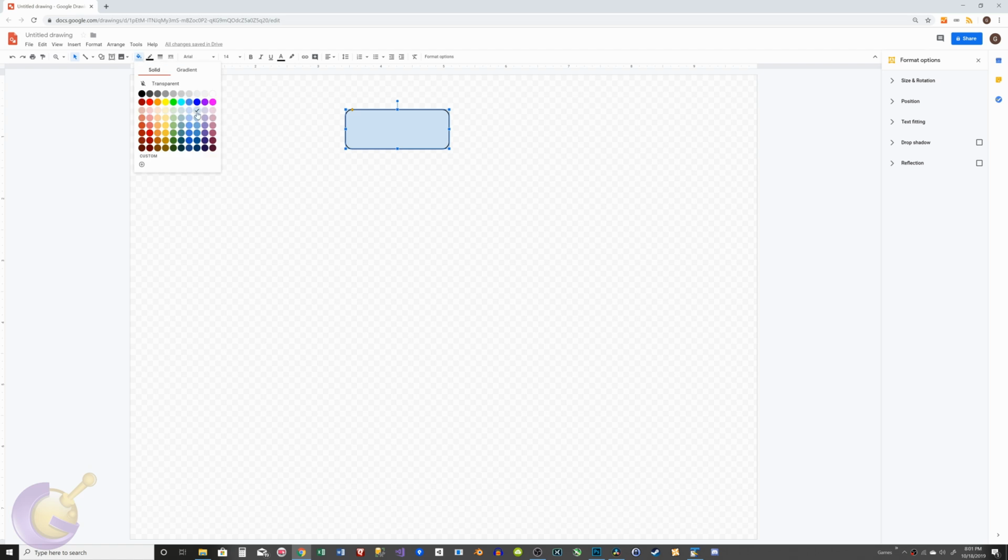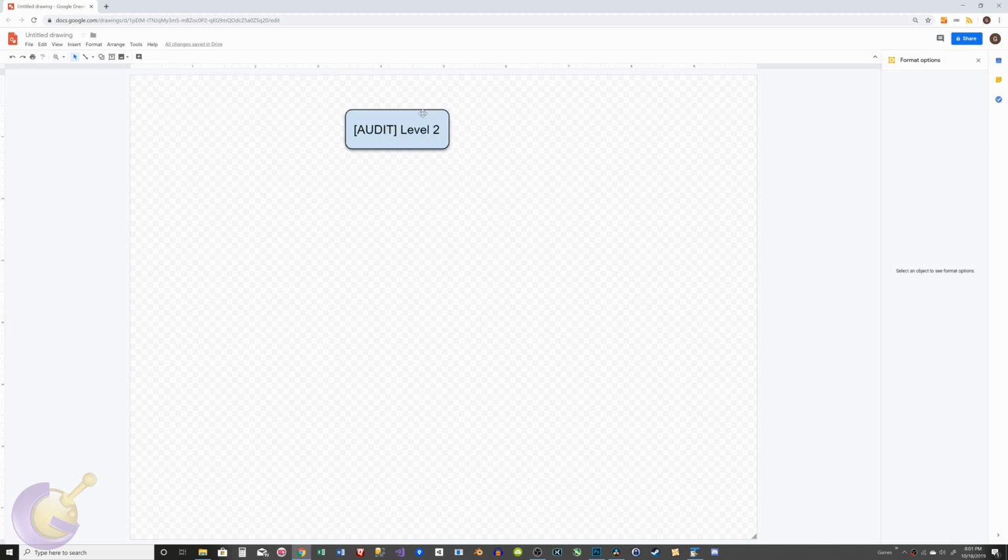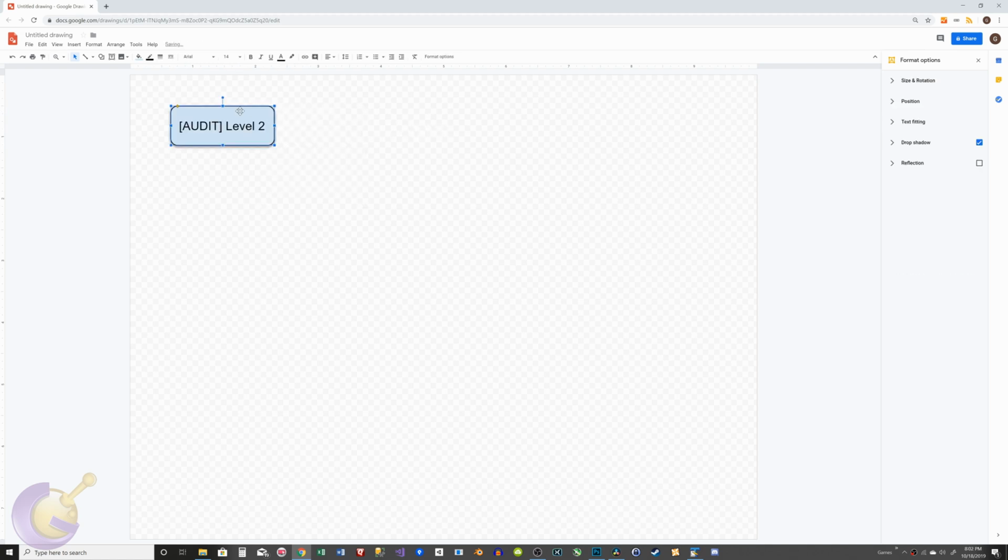I track everything related to this project, not just code tasks. Creating a model, or a sound, even these devlogs, or some administration tasks like opening a bank account, etc. Everything that takes time that is dedicated to this project, I track in Trello. When it comes to a feature, my approach is to start with an analysis task. The reason for having an analysis task is to be able to record an idea as it comes without thinking too deep into how am I going to go about it. And it's when I drag this analysis task into the sprint that I think about the implementation.